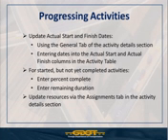So when you're thinking of that concept of the data date, it's based on whatever that new data date is, how much more time do you need to complete an activity, right? It's not automatically going to reduce the duration of an activity. If you have an activity that's 45 days long and it's worked 30 days, if you don't reduce that remaining duration to 10 or 15 or however many days you actually have left to work on that activity, it will continue to schedule a full 45 days more of work out in the future, right?